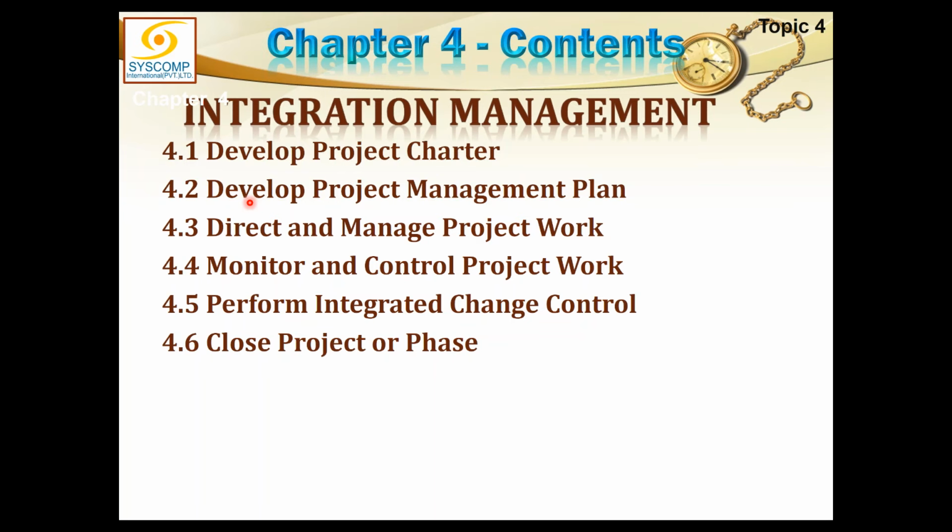The planning process group is led by the integration process, develop project management plan. The execution is led by the process, direct and manage project work. And as far as the monitoring and control is concerned, we have got 2 processes. One to look after all the analysis part of it, which is called monitor and control project work. And the other, which deals with all the change requests, it is called perform integrated change control.